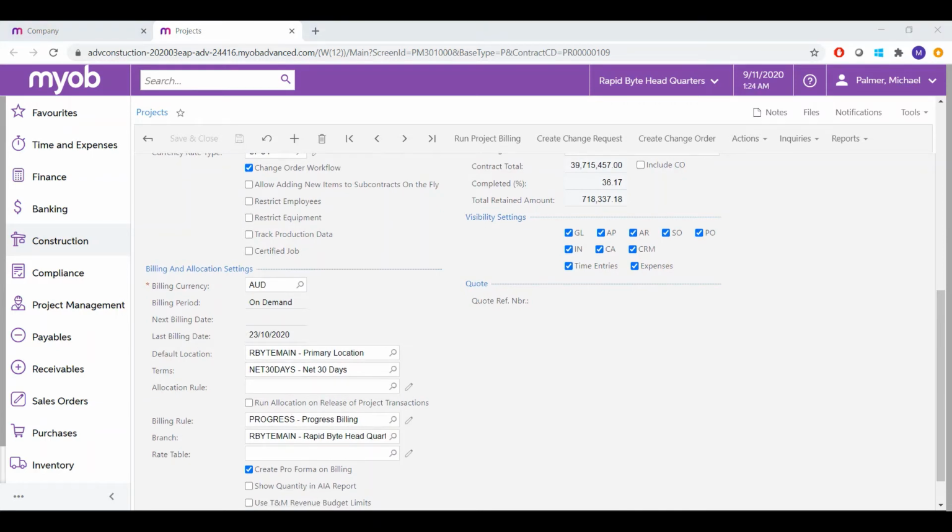Now, as we've discussed during the overview, the billing engine for projects in the system is very configurable. So you can set up all sorts of billing. Whether you're handling progress billing or milestone billing, that really allows you to bill based on what you've completed, or if you're doing time and material, that takes it from the actual costs, or even if you're doing some sort of cost plus engagement where you're putting a markup on top of the costs that you have from your subcontractors or the cost of materials. All of those can be handled by the system because of the configurable billing rules that we have.